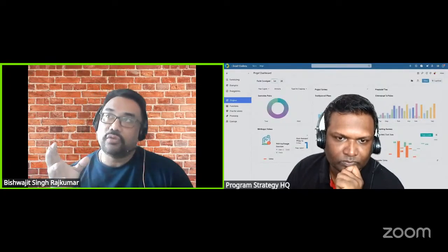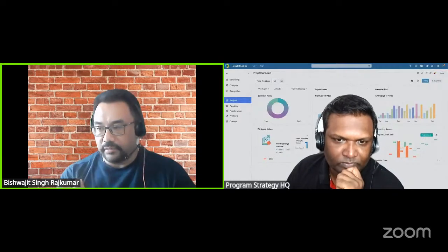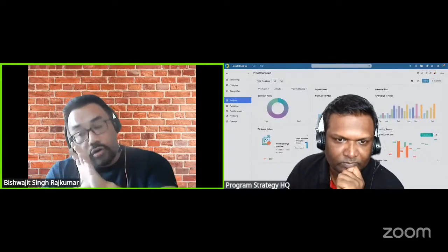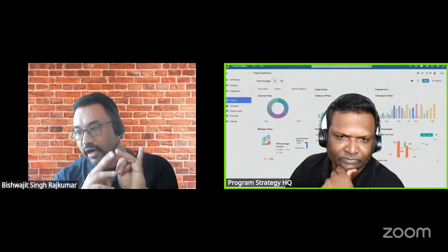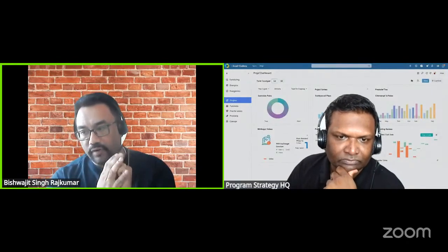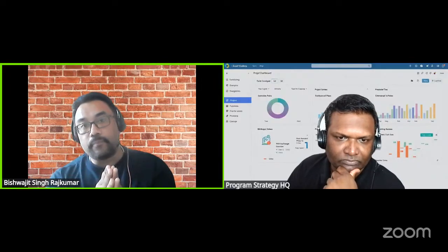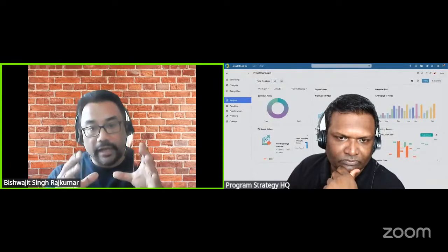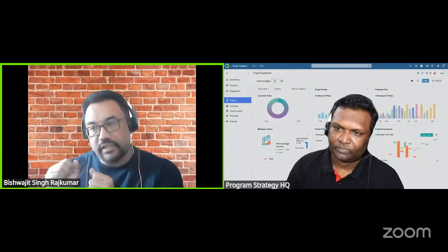What I make sure is that the training is completed within that 15% buffer. It's not only for training. You have daily stand-ups and other sprint ceremonies. All of those have to be done within this 15% buffer, and 85% is the actual output, the core development work, and non-development work is the 15%.